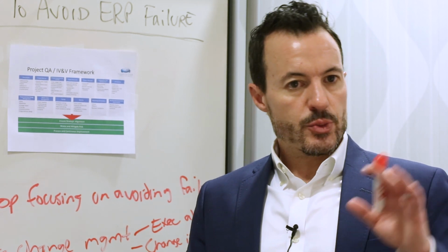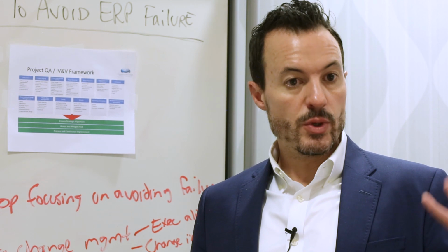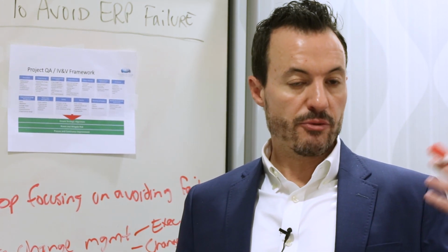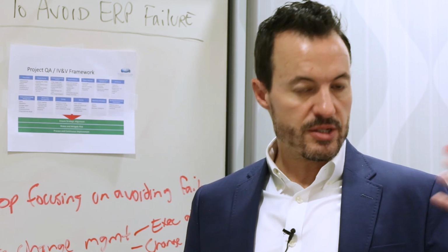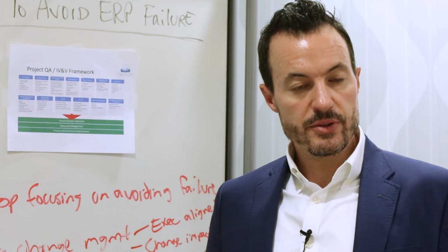So making sure that all those requirements we defined early in the evaluation and in the planning process, that we said we wanted to get out of this transformation, making sure that we go back to that and confirm and validate that the vendors and the system integrators and the consultants are all delivering on what we expected to get out of the transformation.